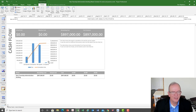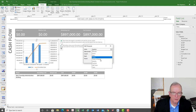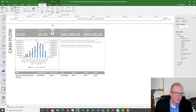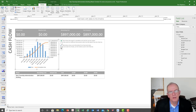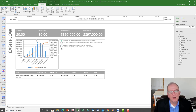The cash flow report shows how much money is going out by quarter, but quarterly isn't that helpful. I can edit the time field to show by month instead. These blue bars represent how much money goes out every month. You can see it peaks in September at around $170,000 going out — I better make sure I have around $170,000 coming in, or enough liquidity in the bank, or enough line of credit to cover that amount.